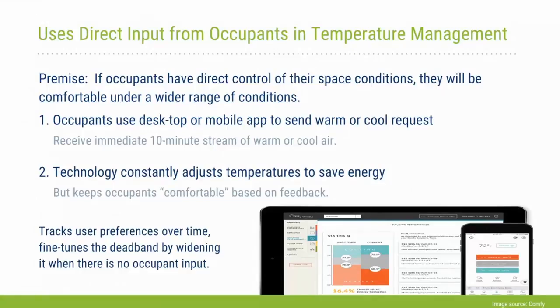Anyways, as we were commissioning the system, the vendors would put in the too hot or too cold signal. Within 10 to 20 seconds, we would detect the pulse of the cool air coming out of the VAV boxes that went full open, and that would last for 10 minutes.